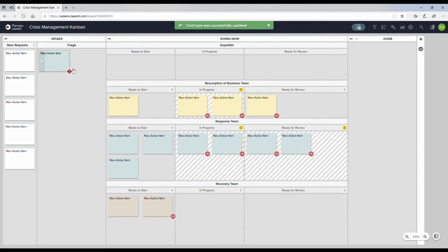Now, in the scenario here with Kanban being focused on finishing the work, well, what do we do with this? Right, do we swap this out? Do we put it in the queue and wait for them to pull it next? Here is where we would leverage the expedite lane. Right, the expedite lane would hit the board, the team would come, we would do the check-in on the board, there would be some sort of notification, right? But this item being up here in expedite is a trigger for this team who is responsible for this item to basically hit the pause button on all of this work.